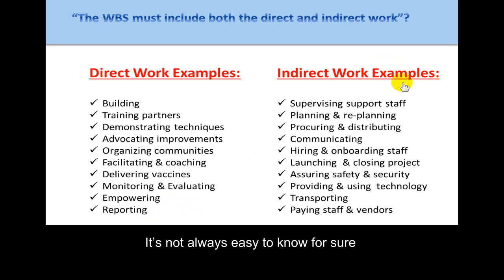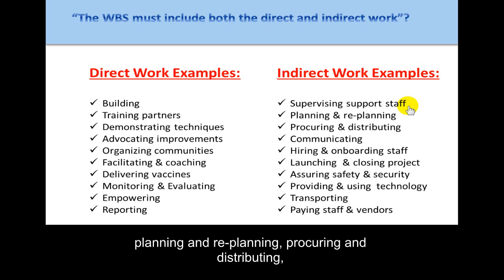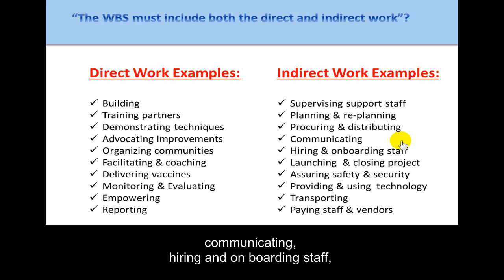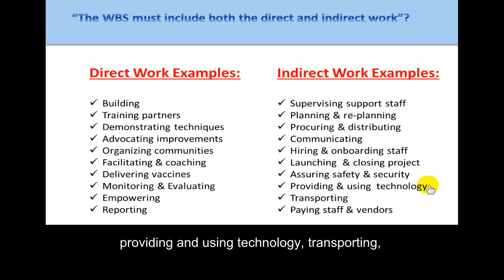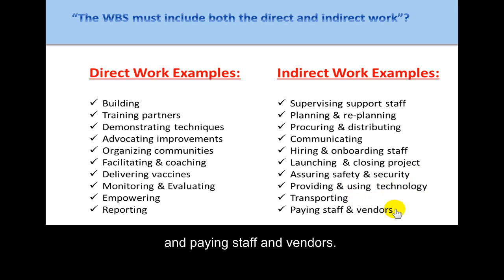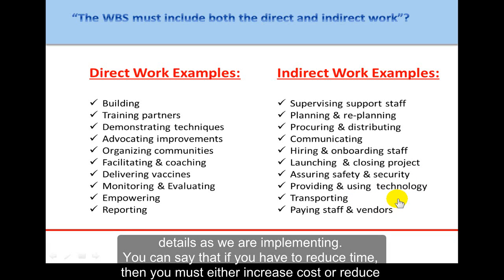Indirect work examples are a little more difficult, and it's not always easy to know which category the work should go in. It includes things like supervising support staff, planning and replanning, procuring and distributing, communicating, hiring and onboarding staff, launching and closing the project, assuring safety and security, providing and using technology, and transporting and paying staff and vendors. We often forget to put these categories in our comprehensive list of work to be done.